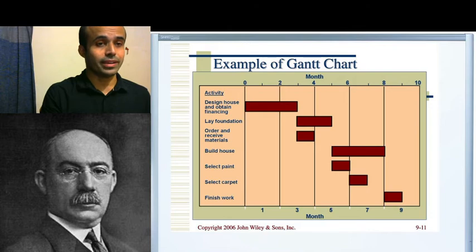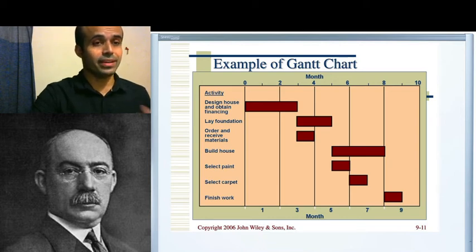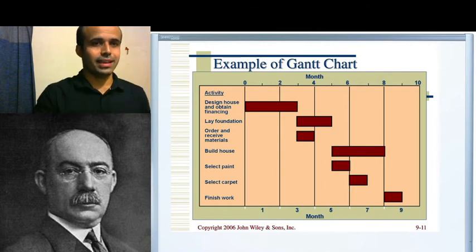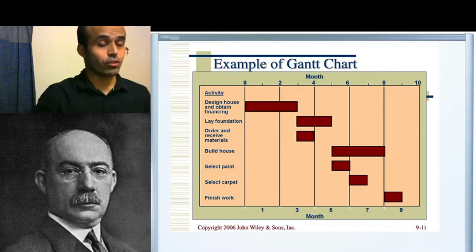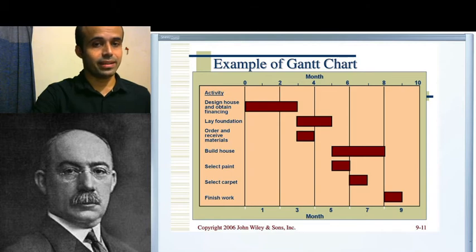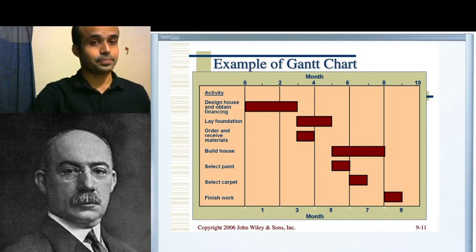This is one type of technique of controlling. You can see the months indicated under the chart — which month and which task will start is shown in the picture. Before starting the construction, you have to draw this Gantt chart. And when the construction work is going on, you have to follow this Gantt chart — when the design will stop, when the layout foundation will be finished. For example, after three months, the design house and obtain financing will be done.